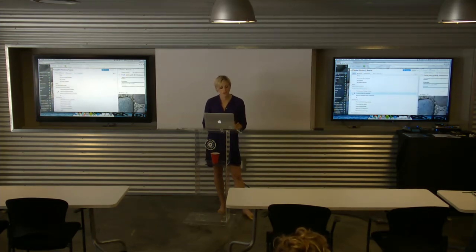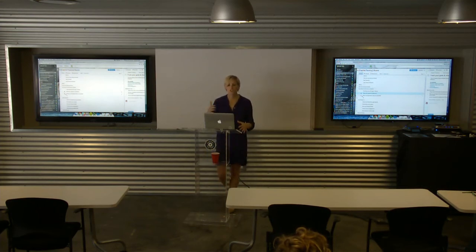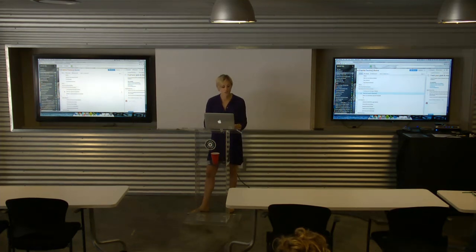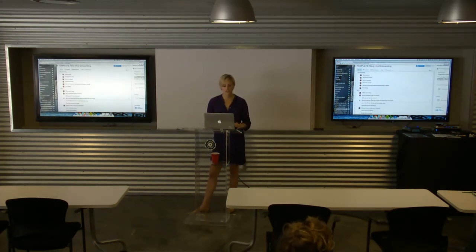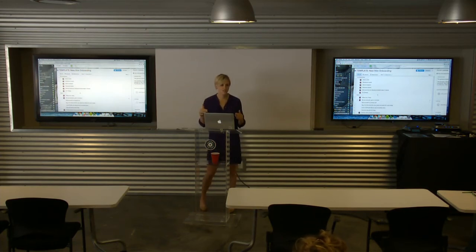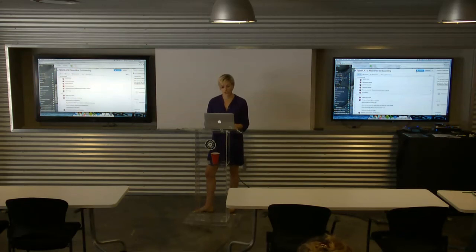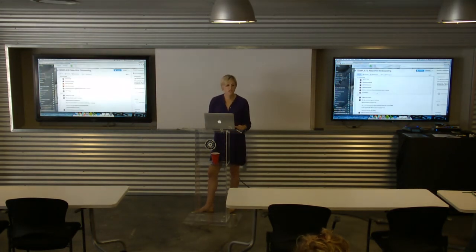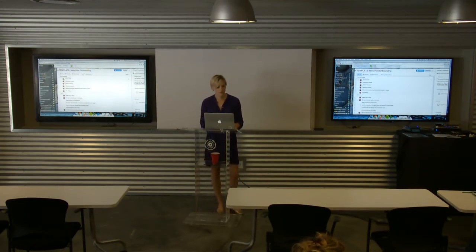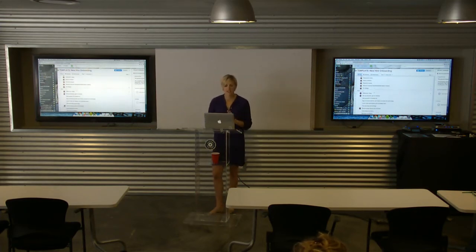And in that same vein, any work that y'all have, if you're generally going through the same steps over and over again, I would suggest building out templates for that sort of thing. I'm going to show you a new hire onboarding example, but think of this as anything that you do regularly. If you're going through the same iterations, building out a project or even a task to address those means that, in this instance, we have a new hire starting, so all I have to do is go here and copy this project, and it's going to copy over all of the details. We assign people in our templates, our go-to people, to the tasks, so that when we copy it for a new person starting, Brittany, our office manager, will get notified, hey, we need you to do all of these things before whatever the date is. So it's like taking out some of the work when you're generally going through a lot of the same motions again and again.